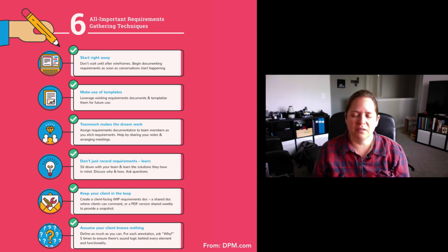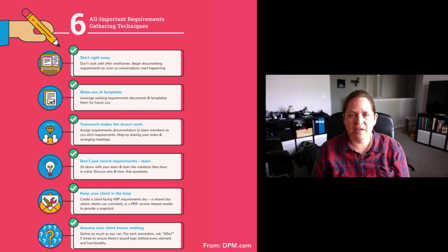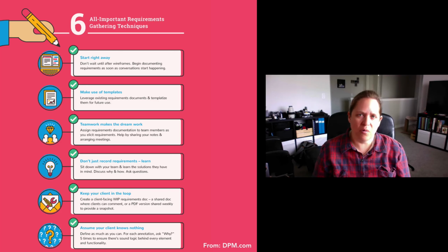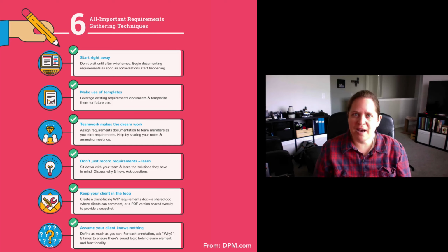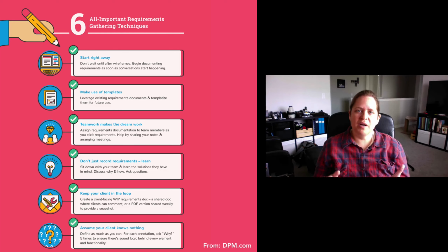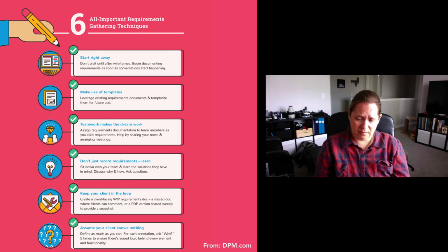This is absolutely critical. When you're working with people, especially if it's a project over multiple weeks, even if you have nothing to report that week, always report saying, this is where we're at. This is what we've learned. Give them feedback, because some clients prefer to be in the loop every couple of days.